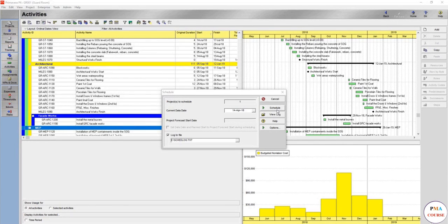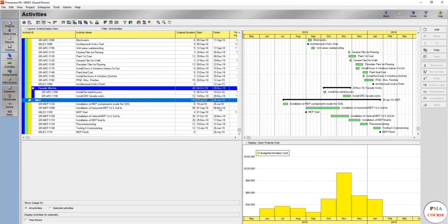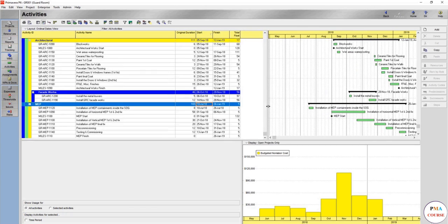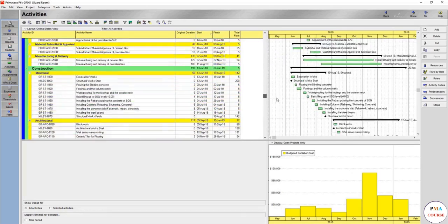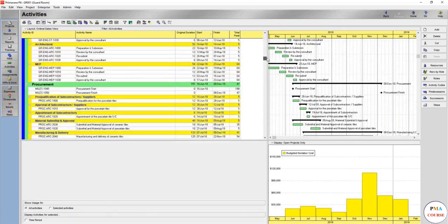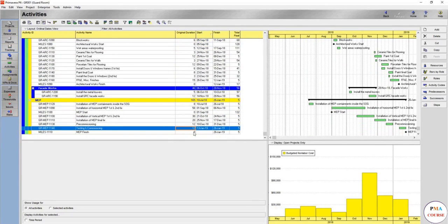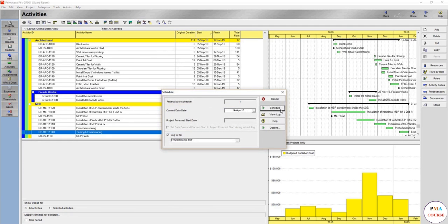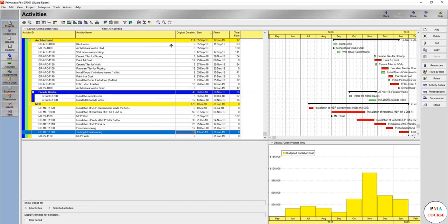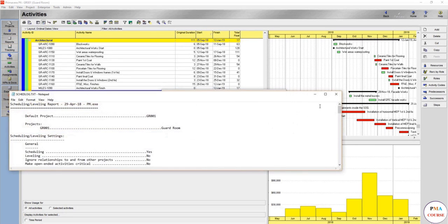As you see here, it's actually 0 critical activities. There's no critical path. So why is this? The end date here is 26 January, and even the lowest total float, as you can see, is 5 days. Why? Because we made this 12 instead of 17. But now if you run, see, just this simple change changed everything. Let's view our new log.